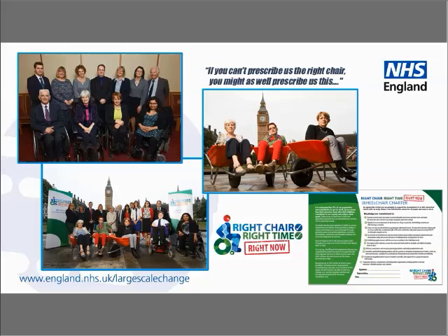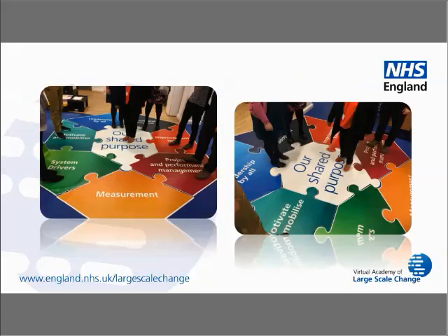From the outset then, we used the change model to frame our support offer and to provide us with a diagnostic tool to assess organisations' readiness for change, prior to creating 30, 60, 90-day action plans to support them with their transformational programmes. And this approach was really successful when we used it with 4 CCGs, in particular in the north of the country, to help them to further develop their wheelchair services transformation plans. So what we're going to do now is have a very quick go at running that change model diagnostic.